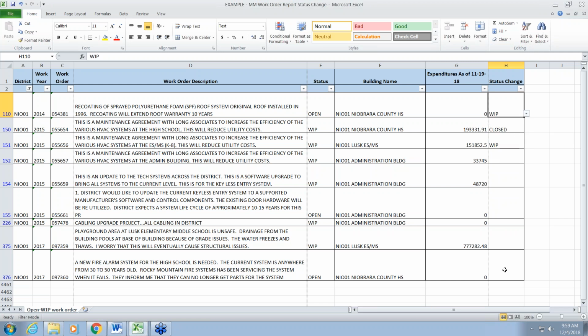So once you fill this out, you will want to email it to me as soon as possible for any updates, and then we will be able to get it updated in the AIM system. Now, granted, you may find some work orders that duplicate each other. Please understand you don't want to cancel one and not the other. You want to maintain, if there are any duplicates, that they have the same status. The reasoning is there's probably two phases. One might be electric, the other will be plumbing, and you want them to maintain the same status going forward from here.